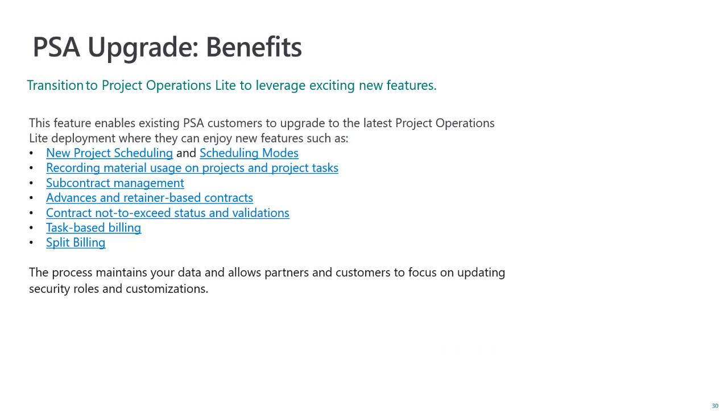Two other very important features are task-based billing, where you can have one project work breakdown structure associated with different project contract lines, which have potentially different billing arrangements.